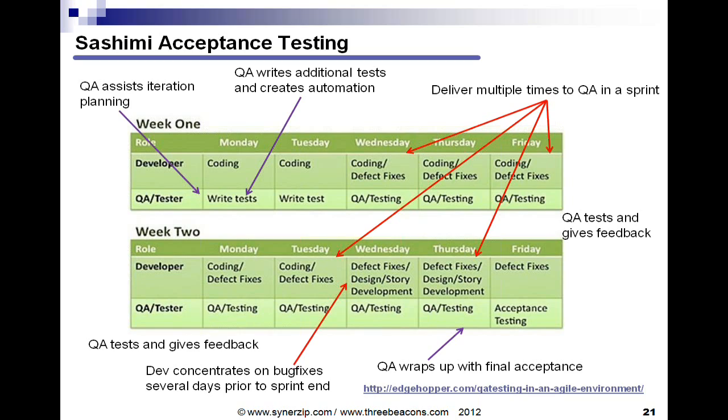Now, this is also a good comment to the software developers. With only a 2-week run, don't just give your QA folks your software by the middle of the second week. That's not going to work. As soon as you have some semblance of a functional slice developed, even if it's incomplete, go ahead and give that to your QA person and ask for their feedback.